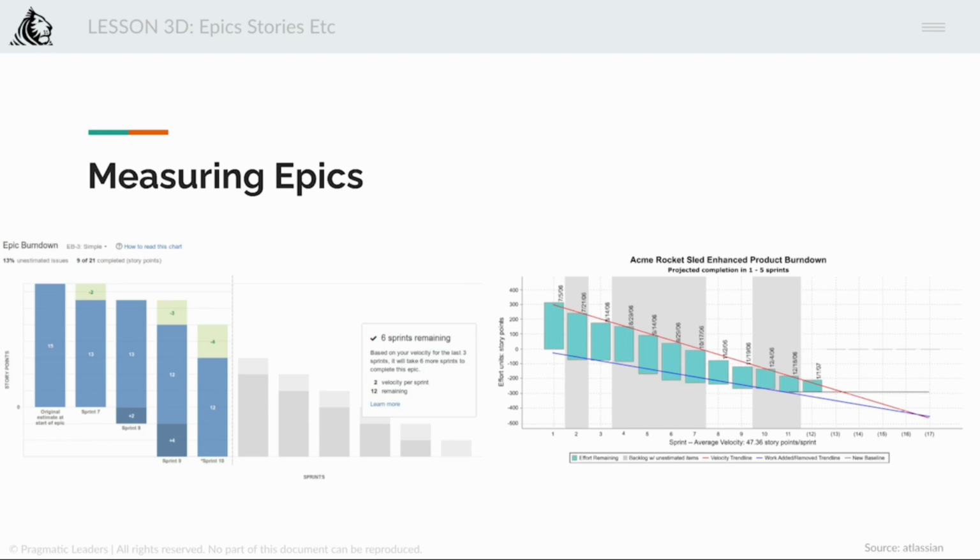Okay. So since a sprint may contain work from several epics and versions, it's important to track both the progress of individual sprints as well as epics and versions, right? So the sprint is going at its own speed. We are seeing how fast or how slow it is going. That is great. But at the same time, epics are also finishing at their own pace as the sprints are going, and versions are also getting closed as the sprints are completing. Correct? So it's important to track all the three.